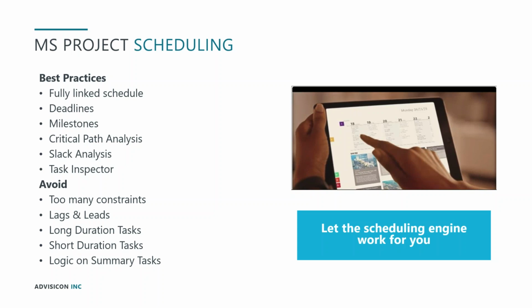If you find that it's difficult to understand the status, you may be unable to recognize that there's a blockage going on or that something hasn't been completed if you're looking at a single long duration task that is actually comprised of multiple operations being done by multiple people or teams. And so you should consider breaking that long duration task up into smaller tasks where the ability to provide status on each of those tasks is simplified.